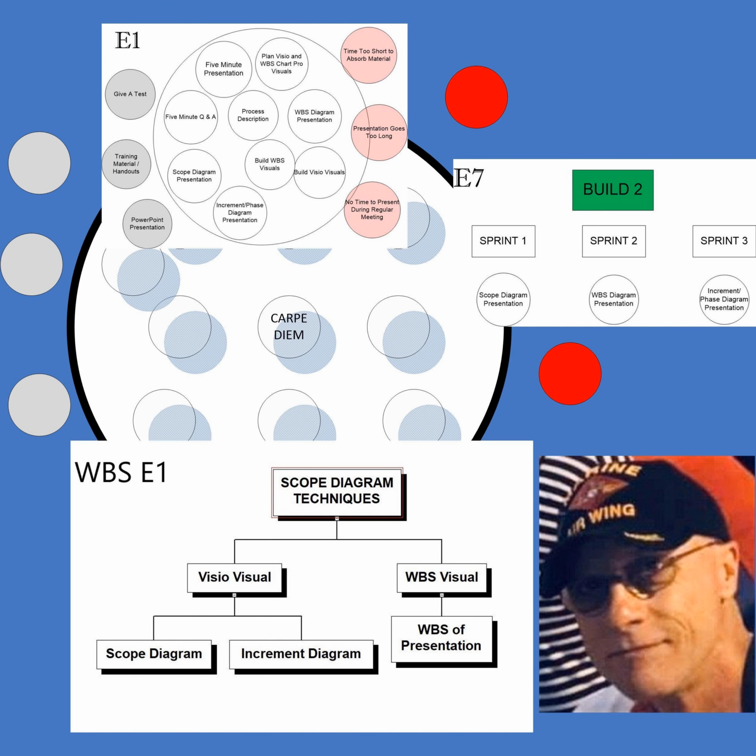So remember, this is the data center move. Let's look at some of the things in planning. Network architecture design, that's got to be the right part of planning. Windows domain architecture design. Let's go down the middle row. Identify the stakeholders. Okay, that was part of my planning. That stakeholder list, I showed you what that looked like, and that's done. Plan the logistics resources. Identify warranty and maintenance providers. So all this is part of planning.